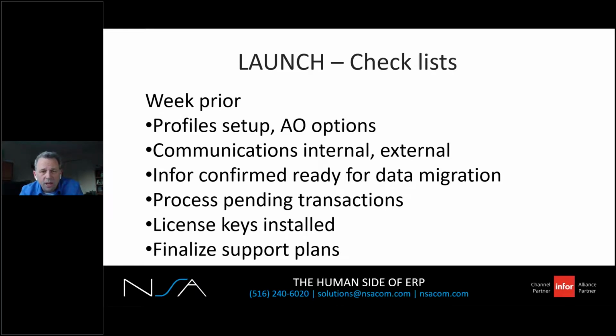communicate externally. Communicate with Infor. Get confirmation they're ready for the data migration. You may want to process any final pending transactions. You may want to confirm that all your license keys are installed. And of course, finalize your support plans, internal and external.